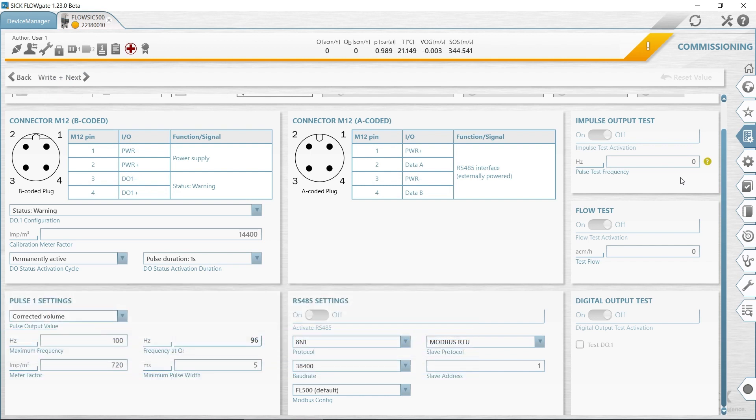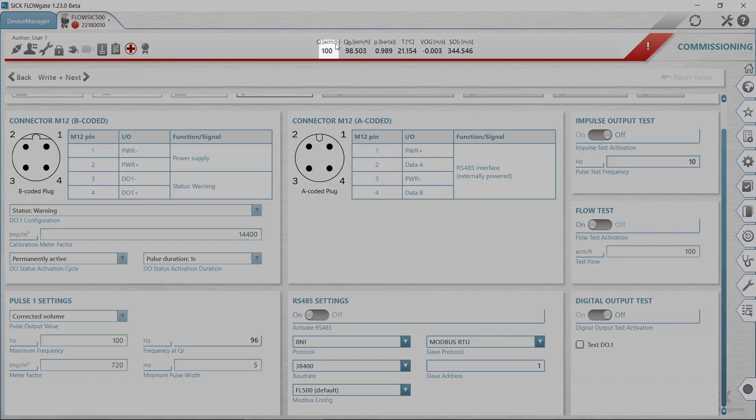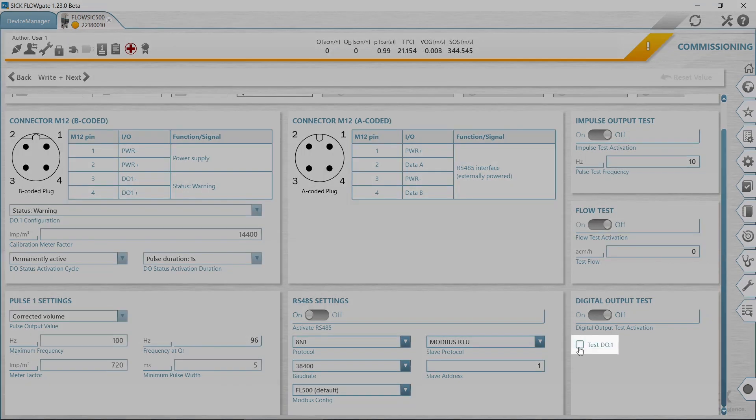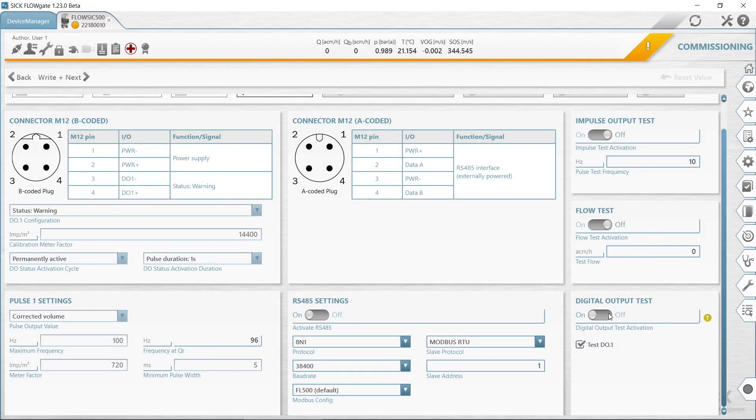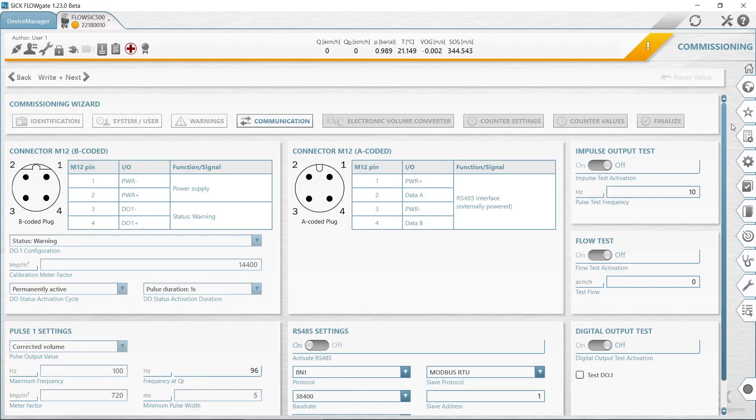Enter the maximum frequency and minimum pulse width in the pulse 2 area when configuring as a pulse output. In the next step, we perform a communication test. The test frequency will be output on all pulse outputs. Also for the flow rate, enter the desired test flow rate and start the test. For the digital output test, select the desired digital output and move the slider to on. During the communication tests, the meter will count all values into an error volume counter.